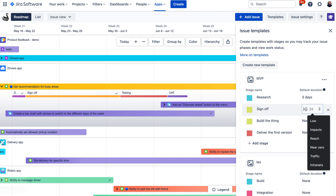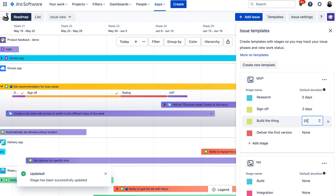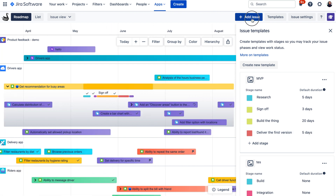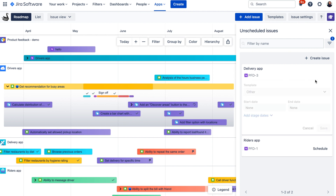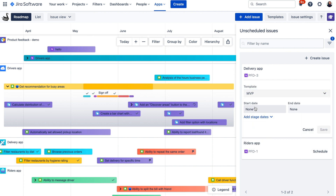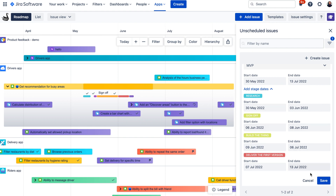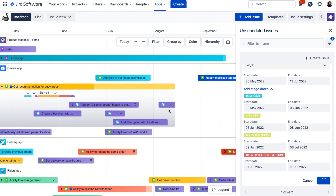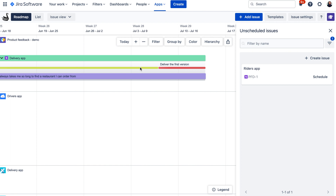The default duration is handy when scheduling issues on the roadmap because it speeds up your planning process. When you want to schedule an issue using templates, click the Add Issue button and then Schedule. Select the template you would like to use, then select either the start date or the end date. For example, if you know you need to start an issue next week, you can select the start date and the end date will be automatically calculated, along with all dates for all stages, based on the default duration set in the template. Once scheduled, you would see the issue on the roadmap together with its stages.